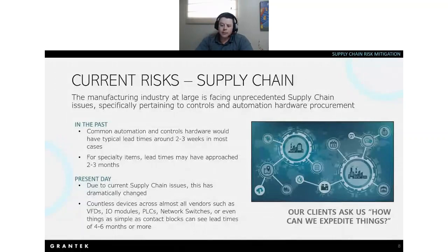When it comes to server hardware, though, you have a few other options. Obviously, as the technology improves for cloud-based server and computing, we are seeing some of our clients switch to a cloud-based server infrastructure to avoid needing to wait on lead times for server hardware. If you're waiting on physical or on-prem solutions for your server hardware, typically you're waiting months for lead time, and then you're also waiting weeks if not months for installation and commissioning. Cloud-based server infrastructure can get you up in a matter of days, and it's something that we're seeing a lot more of our clients adopt in recent history.